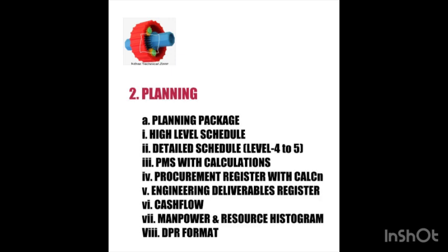Then going to the second point, planning. Being a planning engineer, what are the responsibilities to execute the project? Your first responsibility will be the preparation of the planning package. In the planning package there are several documents you have to prepare, like the high level schedule, that is level 1 or level 2, and the detailed schedule from level 4 to level 5.